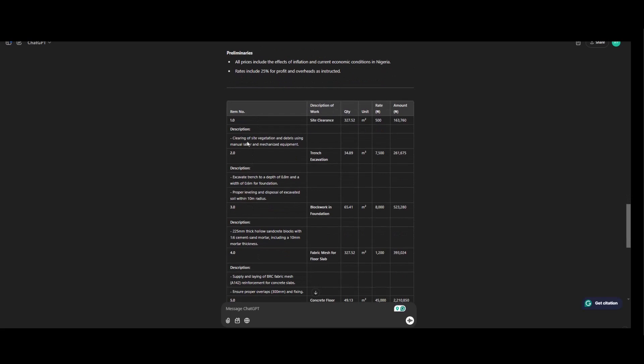So this is our item. First one, site clearance. Clearing of site vegetation and debris using manual labor and mechanized equipment. So this is the total quantity, the unit, the rate and the price. So number two, trench excavation. To excavate trench to a depth of 0.8 and a width of 0.4 foundation. For proper leveling and disposal of excavated materials. So within 10 meter radius. This is the price.